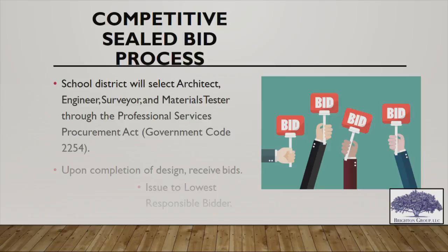So now we're gonna go to the first process, which again is what everybody's used to, what everybody's seen their whole lives, which is the competitive sealed bid process, the design bid build. And under this concept, school district selects a designer, there's a final design, you go out to market, whoever comes in with the low bid builds it, and you kind of hope for the best.